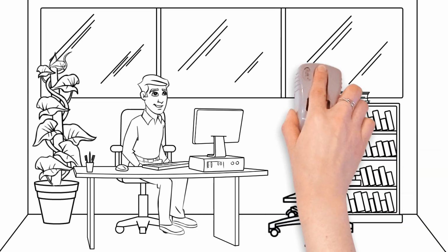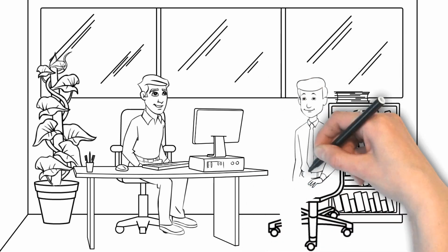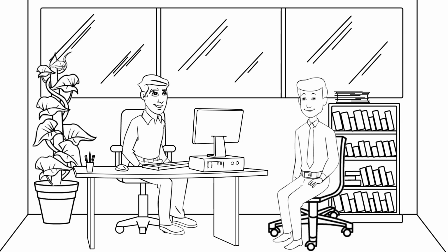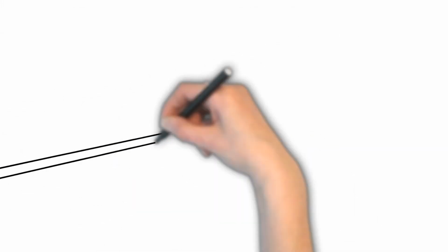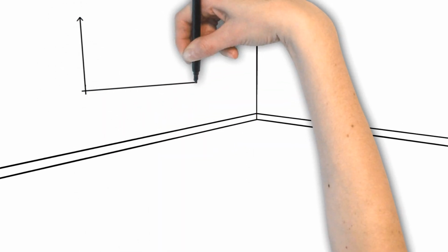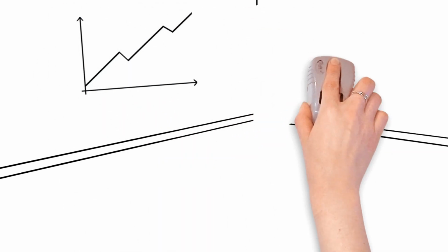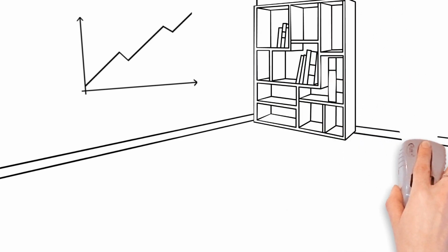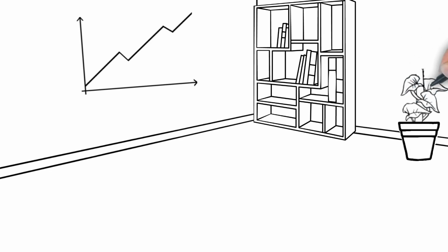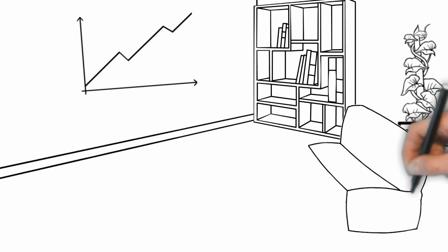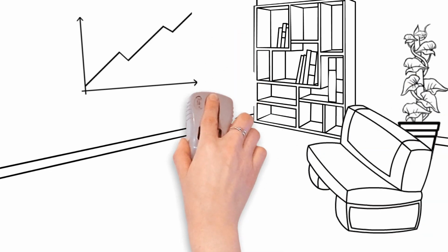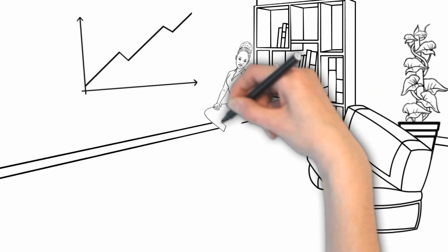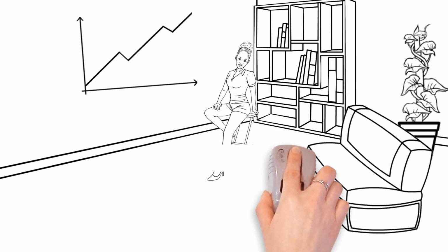Let's look at some examples and talk about the different types of acquiring resources that your project will be involved in. Your list will very likely have included meeting facilities for the project. If the project has identified the organizational offices as the facility that's going to house the project, acquiring is a bit of organizational procedures to get desk space, meeting rooms, workstations, interactive software for virtual meetings. Make sure you actually acquire the resource by making the reservations, getting the approvals.